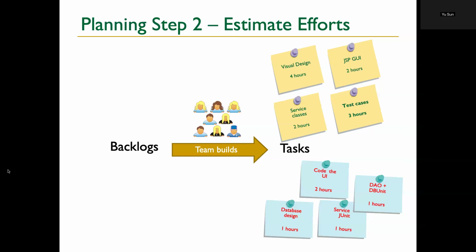Inside professional teams, a lot of the time people do some estimating. They give every single task a number or some kind of indicator of how complicated it is. A very common way is to say this task needs 4 hours or 1 hour or 2 hours. Or they give some kind of points, or sometimes stars, whatever.